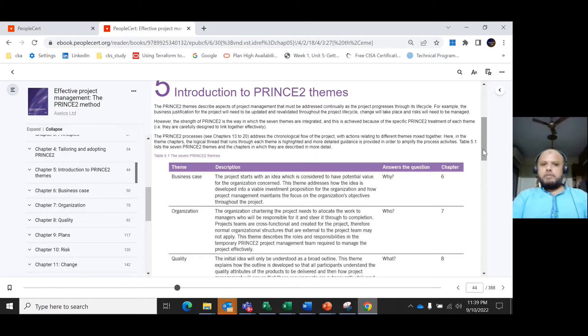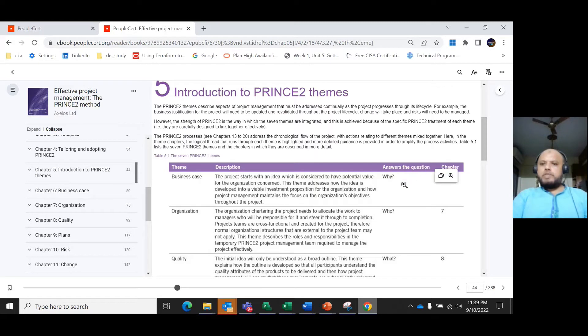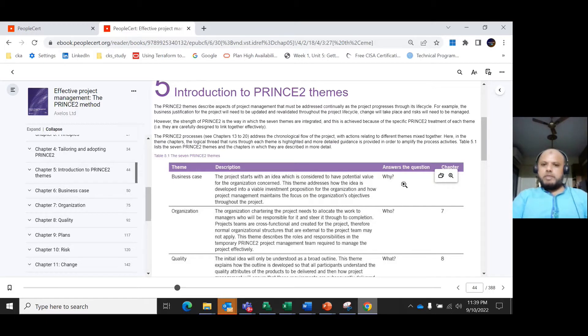First, the seven PRINCE2 themes. The first is the business case, which is very important. It answers the question 'why?' When you begin and justify the project, the potential value for the organization is considered.